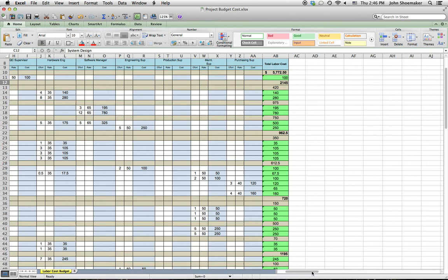It causes people to think that projects are less expensive than in fact they actually are. And if you want to measure the benefits of a particular project against the costs, then you're going to have to do it against all costs and not just the materials and the facilities and the equipment and so forth. You have to include labor costs in there as well.